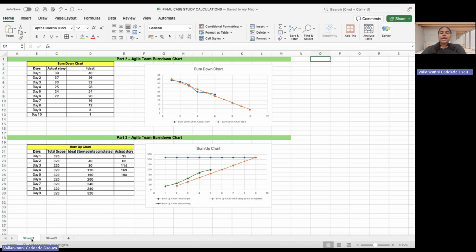To prevent delays, I'd recommend mid sprint reviews to identify the blockers, work in progress limits to improve focus, and swarming and pair programming to tackle tough tasks quickly.